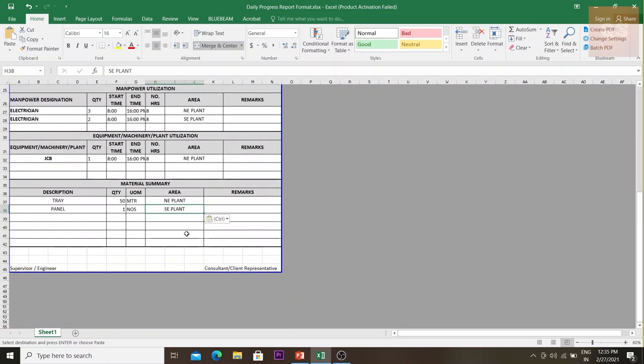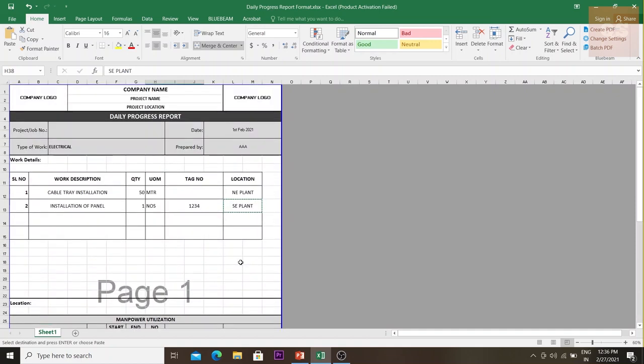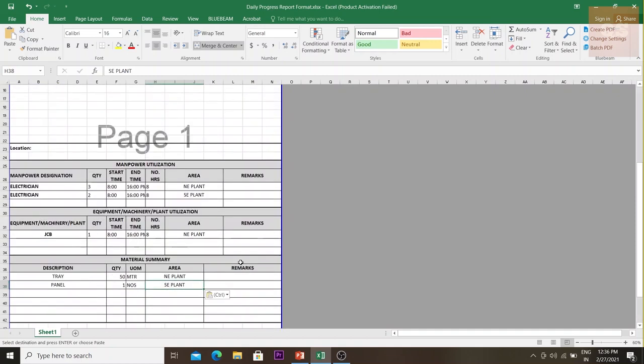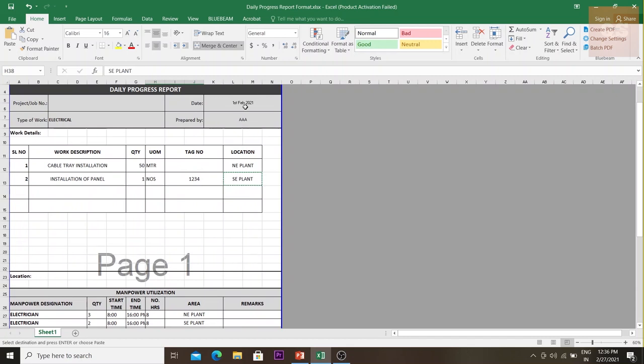Once the work is completed, the supervisor fills in the details. The next day, they sign the report and get it signed by the consultant and client representative. Once signed off, this becomes an official document. Every contract has a cutoff date for submitting the invoice, so you collect all DPRs — for example, from 1st February to 28th February.